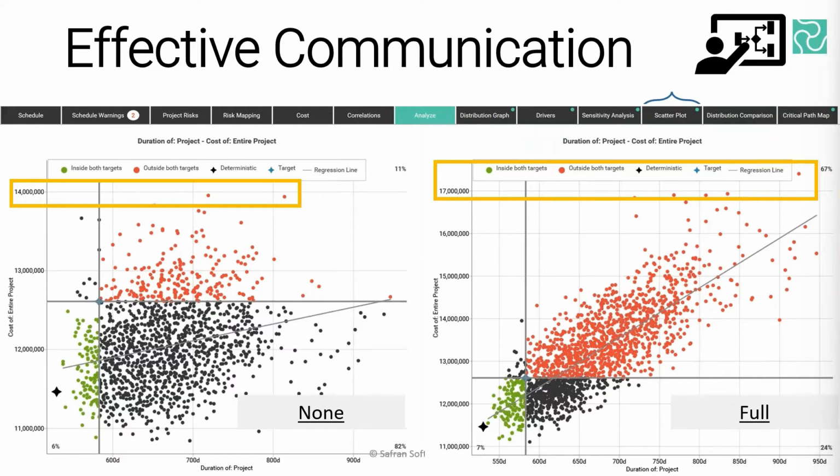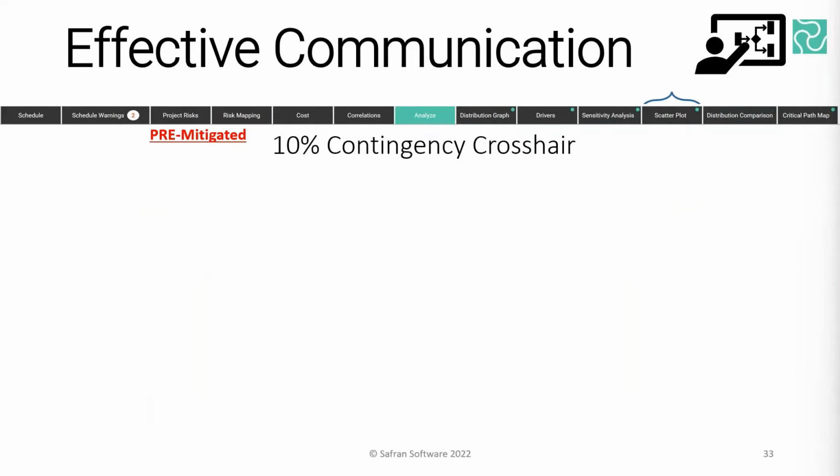The term given to this new p-value shown in the bottom left-hand corner is the joint confidence level, or JCL for short. So previously in my career, I could have said that my cost model has P80 confidence and my separate schedule model also has P80 confidence. But very crudely speaking, I could only ever have had P80 times P80. So you pop that into a calculator, that's P64. That's at best, mathematically speaking, and that quietly ignores all of those hidden relationships that we've just discussed.